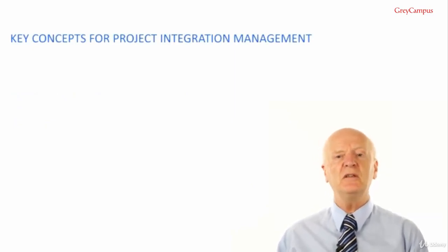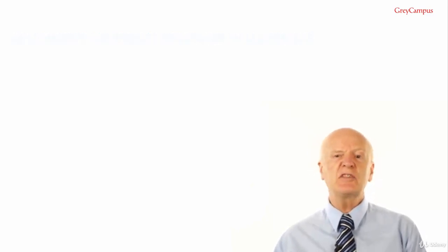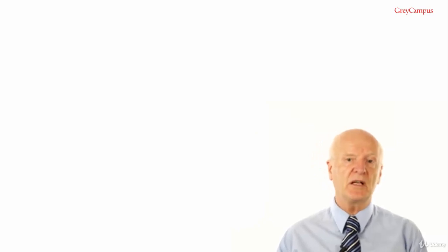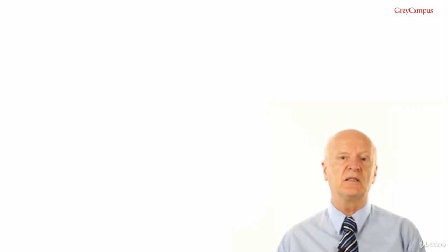Key concepts for project integration management. The project manager manages the project integration management area. However, specialists manage the other knowledge areas. For example, a financial controller may manage the project cost management knowledge area. However, the project manager retains overall responsibility for the entire project. Project management duties generally cannot be delegated, but the project manager can do some of the specialist work, as long as there's no conflict of interest.